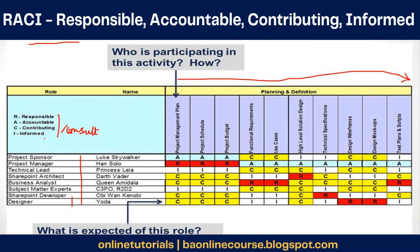The last one is Informed. They just need to be kept in the loop — they just need to know what is happening. They will not do any work and are not even providing any inputs, but they should know what is happening. Usually senior management needs to know, so we keep that role as Informed. Any other systems which are dependent on your system need to be informed about the progress. So anybody who is impacted, you generally keep them as Informed.